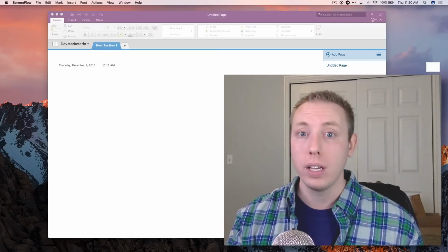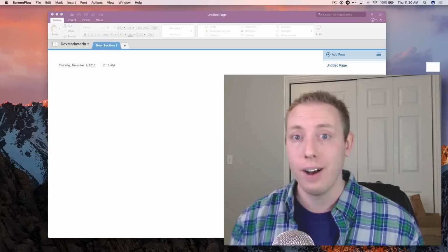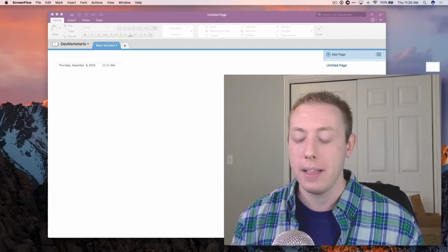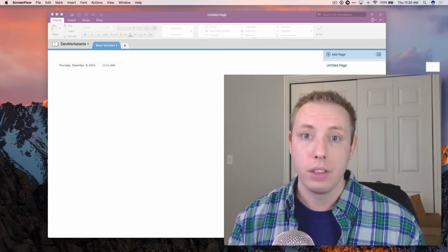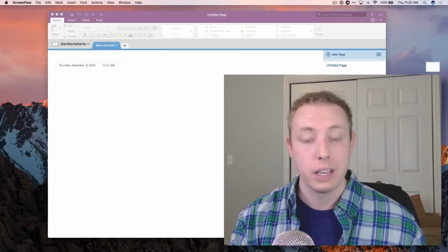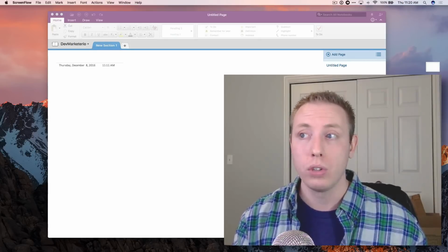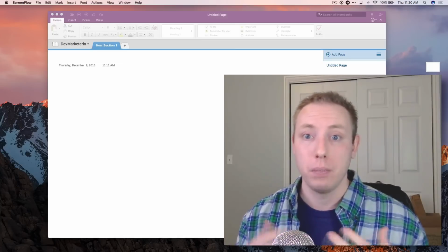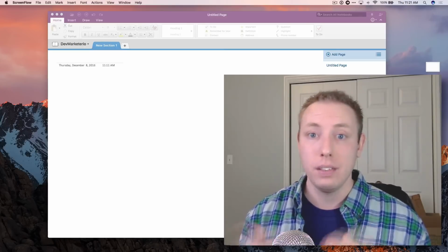You want to set a time where you can go. If it's a local client, I highly recommend you actually go physically to their offices and meet with them in person. If it's a remote client, you can do some sort of Skype or video chat. And tell the client to bring everyone that's going to be related to the project into the room. Maybe you don't want to bring in every sales guy, but the head of sales, head of marketing, and obviously anyone in the digital team or marketing team is going to be crucial. Anyone that's going to have involvement in the project, it's really good to bring them in and let them speak up. Even people like customer service sometimes have a lot of requests, like, hey, can we get these features built into the website?